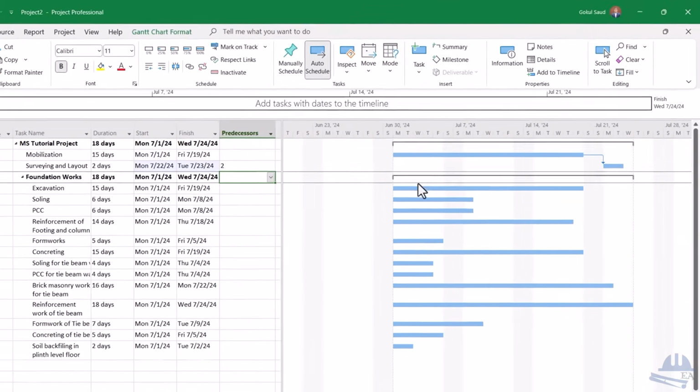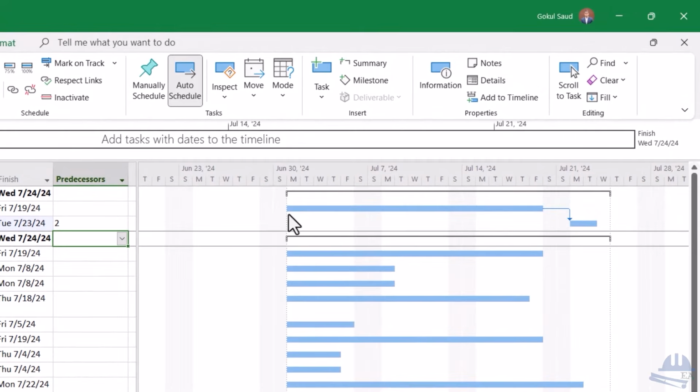So over here if you see, you can see that this task completes on Friday and the Saturday has been grayed, and now the software skips and it goes to Sunday, right? Okay, all right, so why did it happen? It happened because Saturday is a non-working day, and that is why it is grayed out over here. And why is this a non-working day, though we set Saturday as a working day?